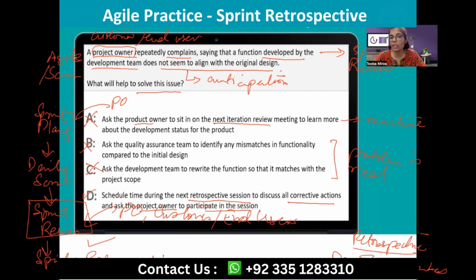I'm not disagreeing with it, but if you go and read the Scrum Guide, you will know that the definitive member of the daily scrum is the team only, not the product owner, not even the Scrum Master. The Scrum Master, if he wants to skip, may skip if his responsibility for the daily scrum is taken care of by someone in the development team.